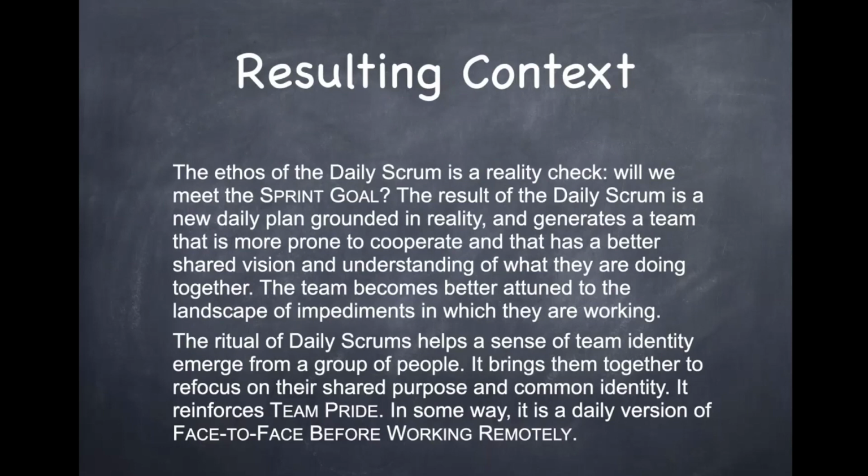So your value stream is the time part of Scrum, the process part of Scrum. So that's what the product backlog is. It's how a feature moves through time. Through time, it moves up the product backlog, and then it moves into the sprint backlog, and then it moves into a product increment. So in that part of the patterns, we're talking about how features move through time.